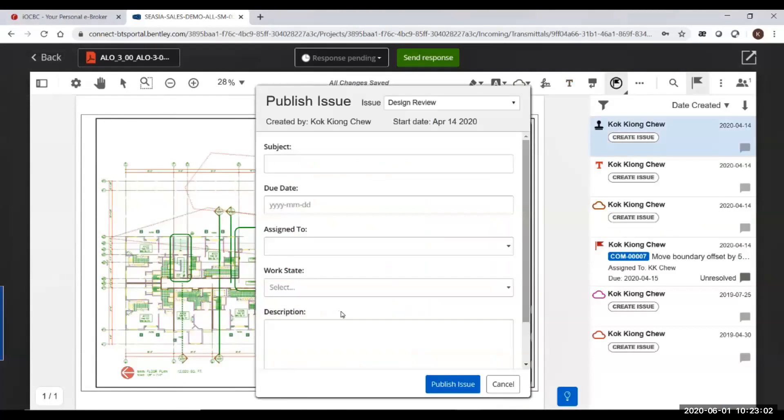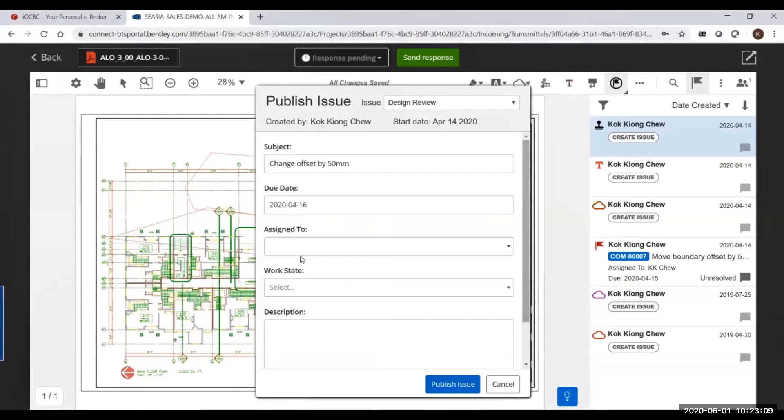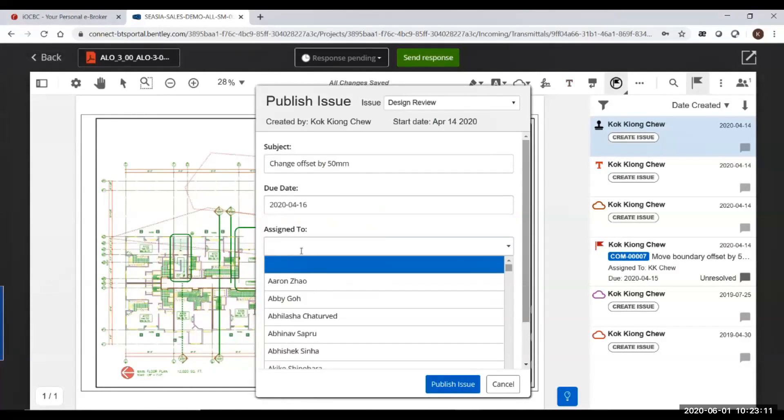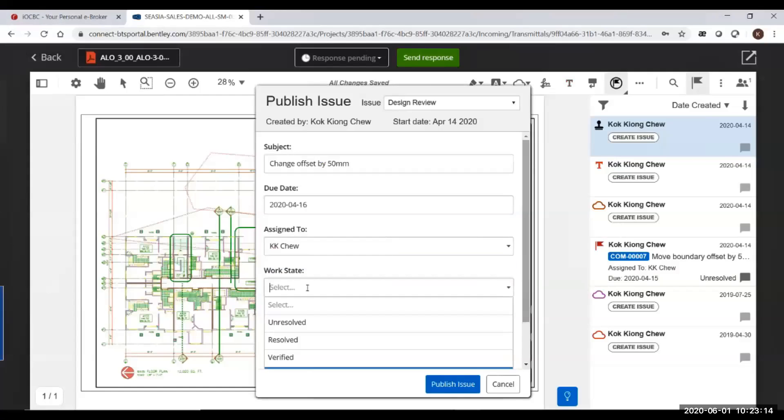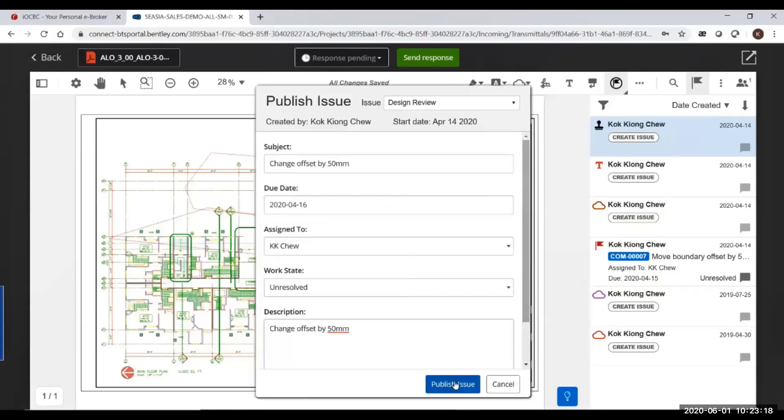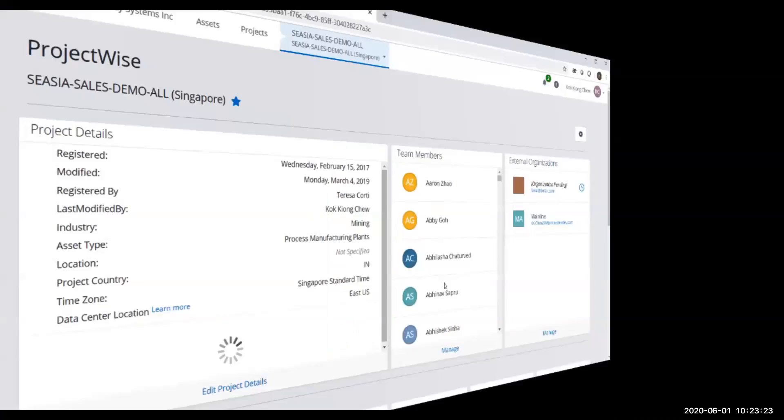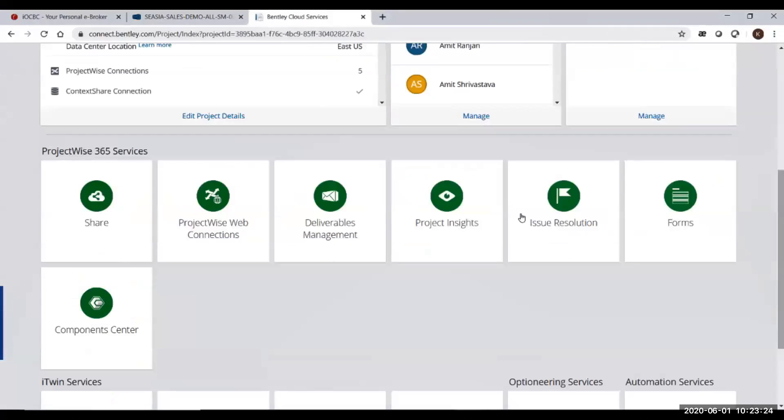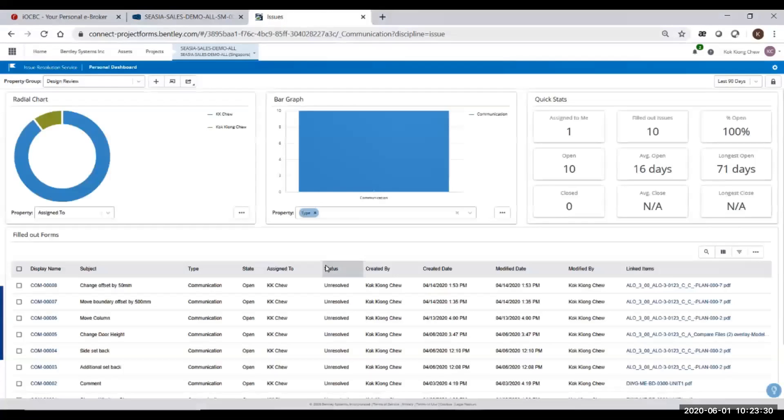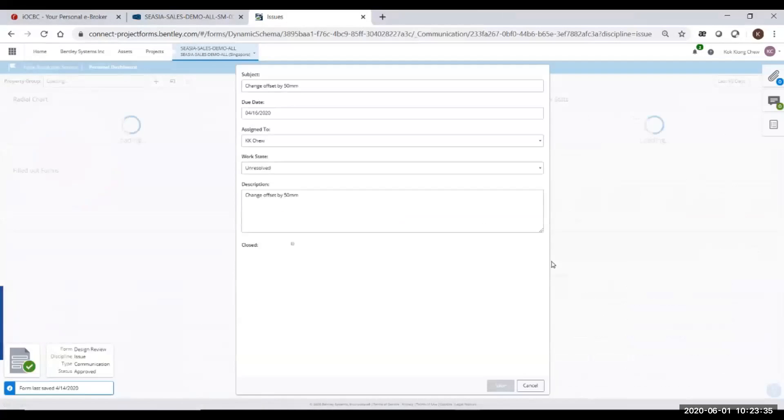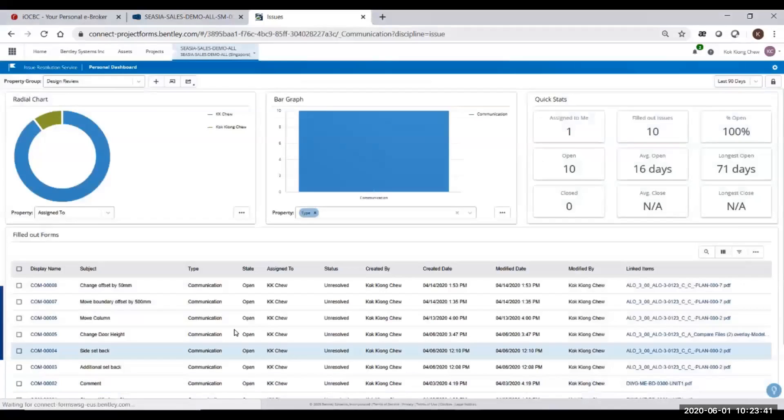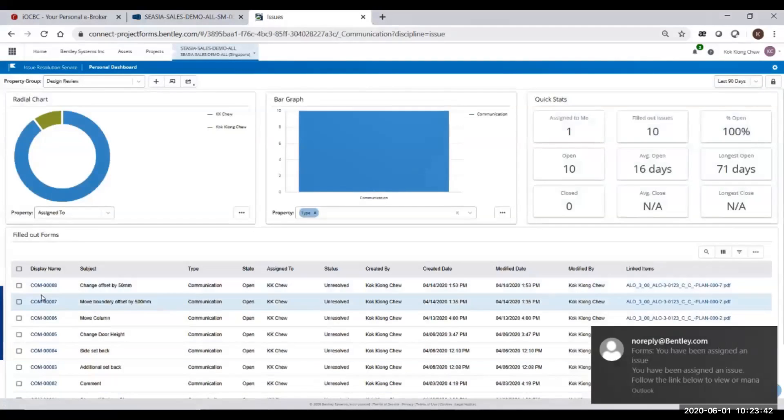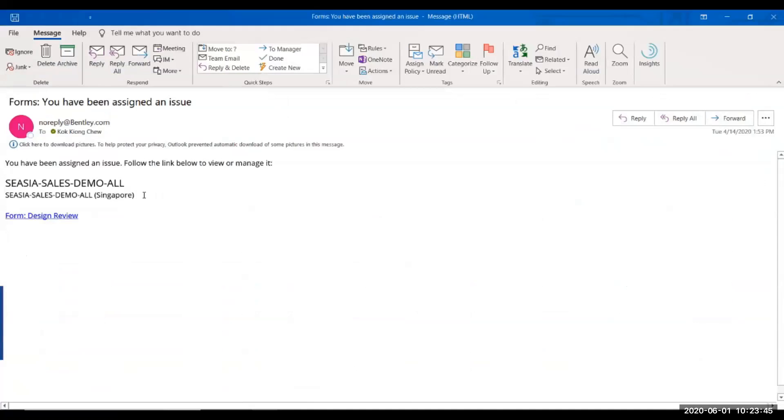I put a flag and the form will come up. I can put a subject saying that this is offset by 50 mm and then assign to someone. Once you assign to someone, this person will get an email notification. It's still unresolved. On the right-hand side is the list of issues. By clicking the issue resolution, you can see an issue register here. You click on the register, you can see all the information collected. You can see all the things that are assigned to you by clicking the link on the right-hand side. They also receive an email notification.